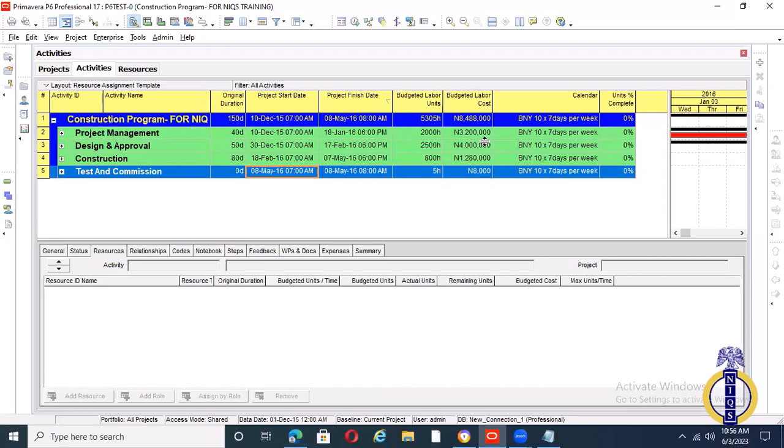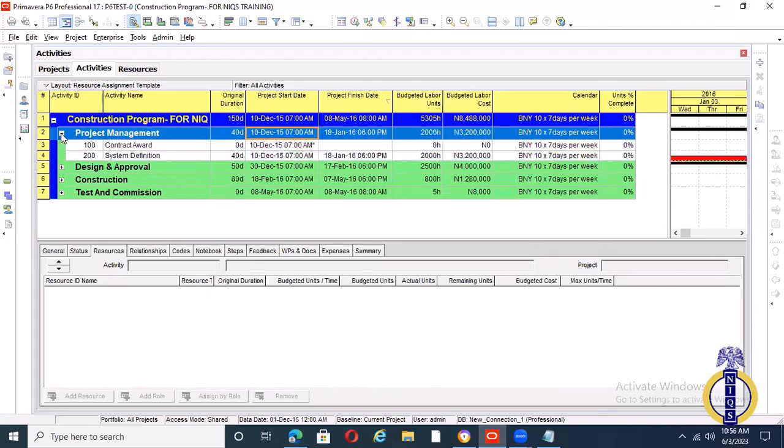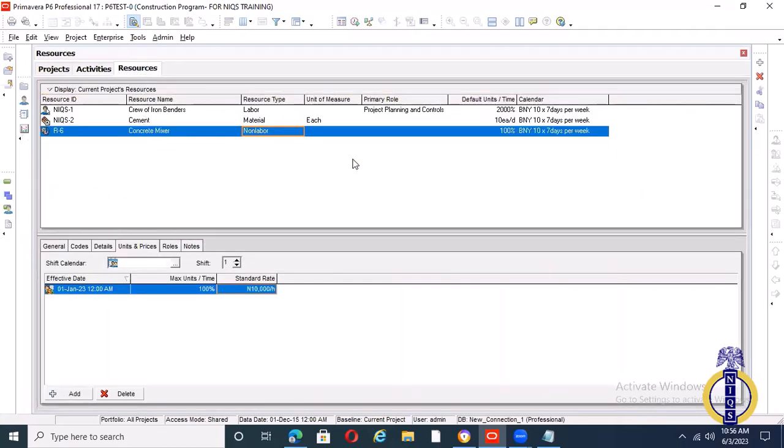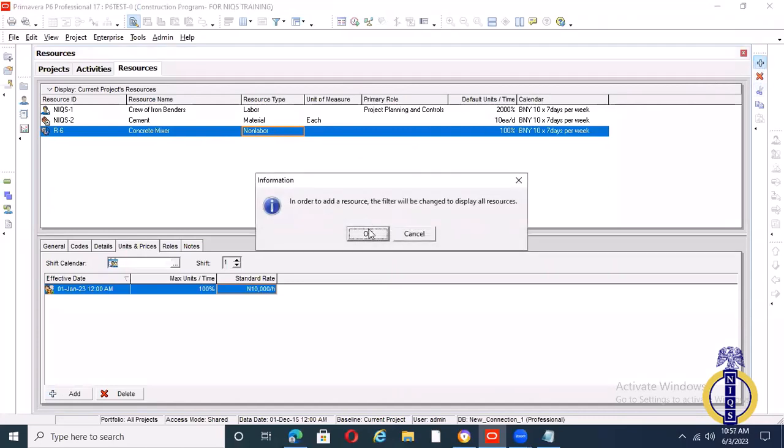So you now use this to merge and look at your BOQ. These totals, as I'm seeing here, is it the same on my BOQ? If it's not the same, what else can I do? So if you have something like a PR, you have some miscellaneous, right? That's usually maybe around project management. So you can go and create a resource here. Oh, we have a miscellaneous that is 20,000. I create the resource, right?